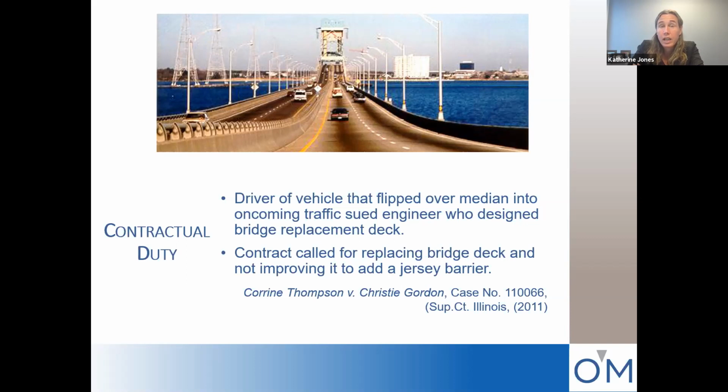Just like in the Thompson case, however, the Illinois court said that you couldn't expand the engineer's duty beyond the scope of what was contained in the contractual agreement with the developer. And so because the engineer was not ever required to set foundation grade levels, the homeowners just simply had no ability to bring a suit against them.